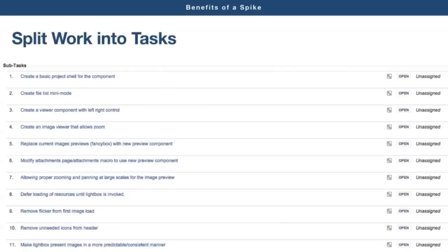And try to plan forward. If you have a feature that you are planning to implement 2 sprints ahead, and you know that spike will be needed, schedule the spike in the next sprint.